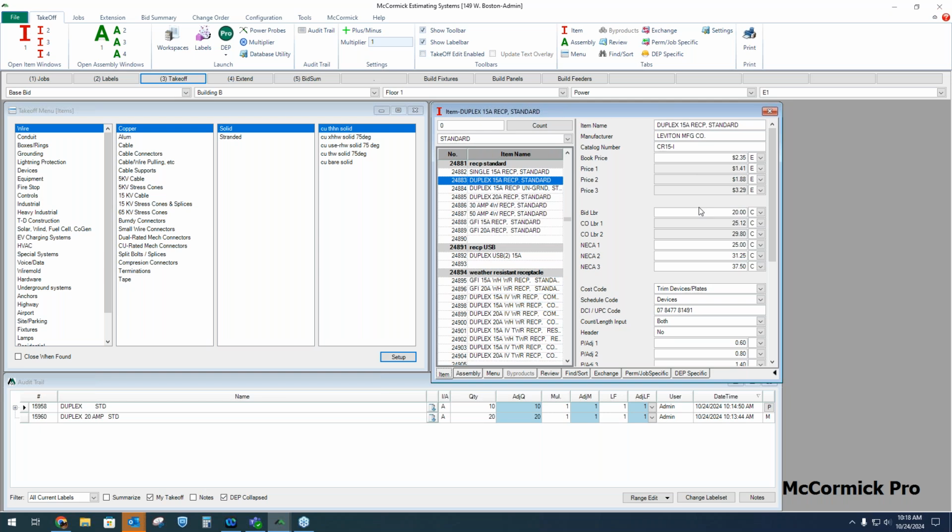So this is where we really start to pick up speed. Having material pricing and labor hours built into the parts, that's already helping. And that also standardizes our bids. Makes us more accurate and consistent, but the assemblies allow us to account for the material very quickly, and we're much less likely to miss things.